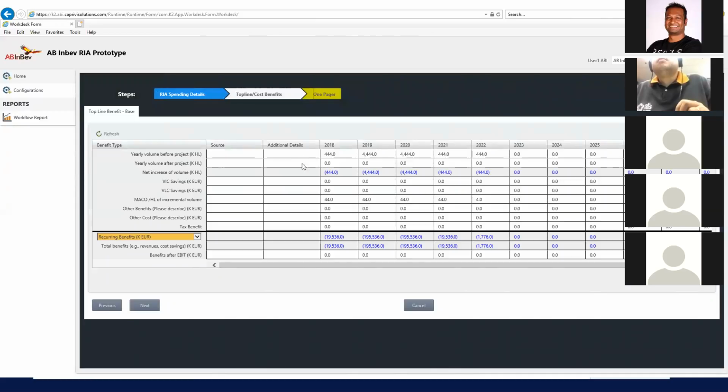All right. So I don't think we're that far apart then. You can import the budget in local currency. Then we know what that amount is, and as the US dollar changes, we are just changing the US dollar amount, but we keep the local currency. Correct. If you're happy with that, then our system is basically designed largely for that.